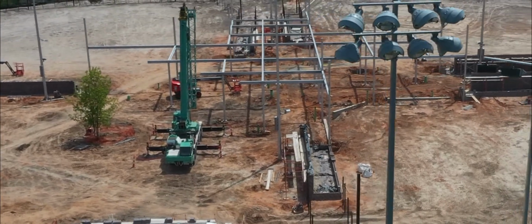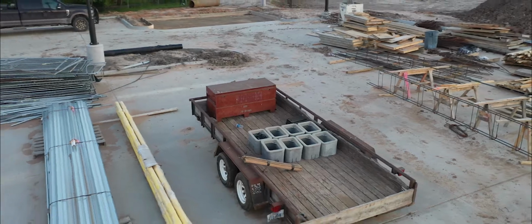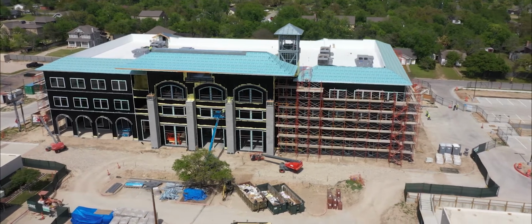The construction industry is massive, and it accounts for between 4% and 8% of the US GDP. And despite its size and economic impact, labor productivity lags well behind other industries. For example, in the last 3 years, only a quarter of projects came within 10% of their original schedule. A University of Michigan study shows that construction workers spend an average of 18 to 19% of their workday idling because of holdups like searching for the tools they need.